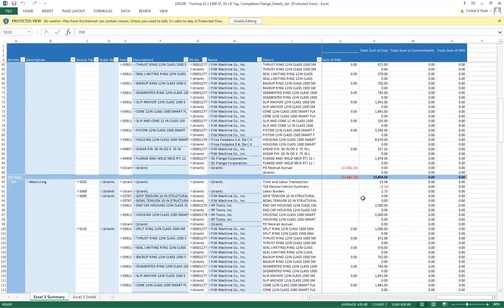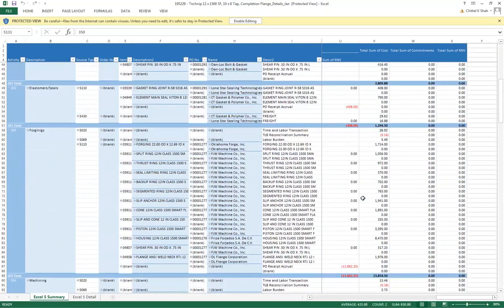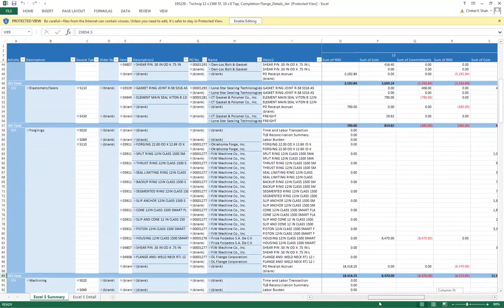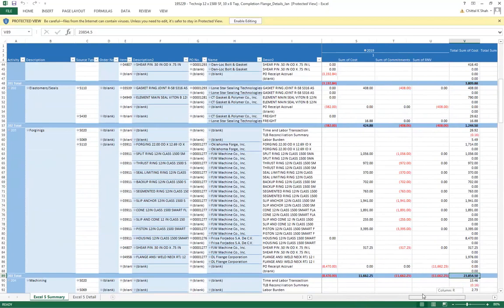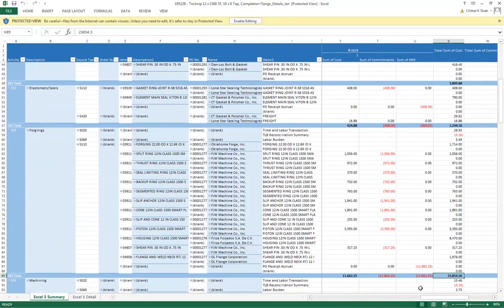For your forging, you had all these POs, and those POs are those total costs, and that bucket should show a cost of $23,000 on it. You can go by month and see month by month what cost was added, if you want to go into that. It gives you all the PO numbers and all the details of what you bought, and you can figure out what's left. As PM, you want to understand what I'm done with and what more I need, so that you can know the budget versus what's actual versus what's pending.